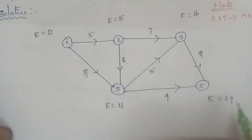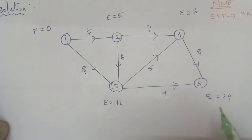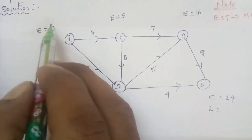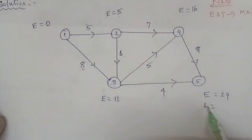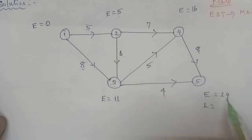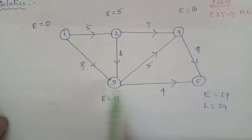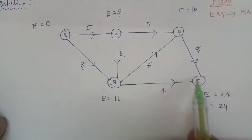Next, we calculate the latest finishing time. The symbol for latest finishing time is L. We work backwards. The initial value for the latest finishing time at the last node equals the earliest start time value, which is 24. So L at node 5 is 24. Working back, node 5 is reached, and we proceed backward through the network.